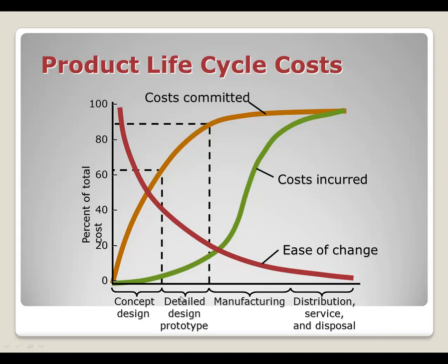But once we spend a lot of money and we have now a detailed prototype, and then we go to the manufacturing phase and we are going to the distribution, any changes will be with high cost. So the cost will increase once we spend a lot of money, and that's enough. We are not going to make any changes. Any change in the design will cost too much. So this is the cost of changing the design.